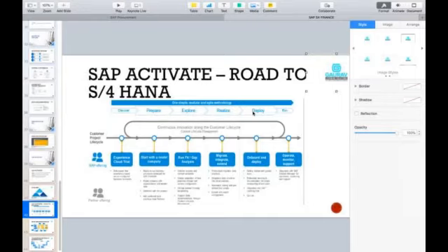Again, it depends, Priyanka. Let's say, for example, if the systems are not ready, you cannot go to the deployment phase. You cannot even go for the realization phase itself. If your system is not ready, you cannot think of any process going into the realization phase. Correct. Right, so we are assuming here that the system is ready, and then for some of the processes you can start configuration, while for some of the processes we are still in discussion with the customer and you have still not finalized the scope. Right. Okay. Thank you.